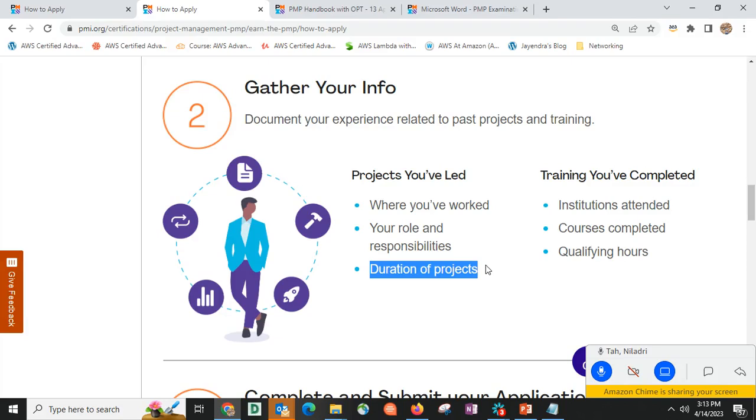and closing. So by now we all have seen what happens in the initiation stage, right? We do the business case. The business case is the input to the project charter where we officially assign the project manager, and also in the project charter we get the key inputs like high level risk, key stakeholders, all the key level milestones, the signature of the program sponsor, and all that. And also the project manager is going to develop the stakeholder register in the initiation phase.